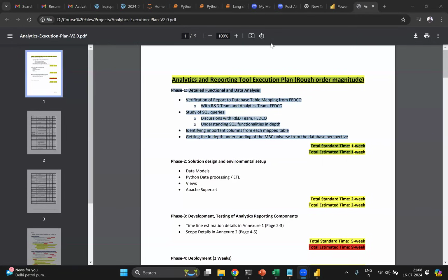This is all done by a Scrum Master. Normally in small companies, with one or two people, only one guy is going to be the product owner, and the same guy is going to be the Scrum Master. So everything is going to be done by him. He is responsible for checking that every day. We call it stand-up meetings. Every day we spend 10-15 minutes, or we call them Scrum meetings. We just discuss what we have done and what our progress is. Apart from it, we will be having meetings with the clients.